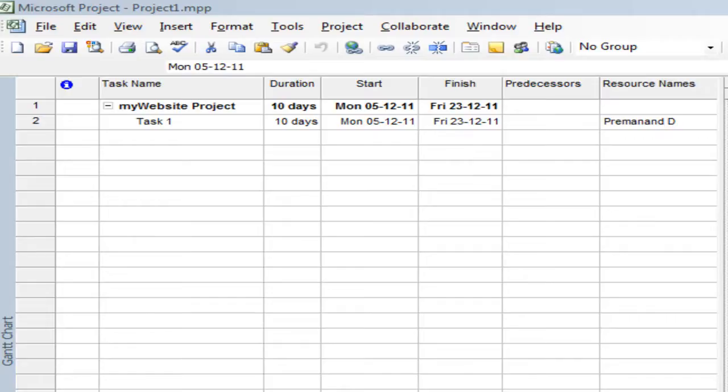So that when you schedule a task for a particular resource or team member and if there is any vacation plan for that team member, then the tool automatically takes care of scheduling it appropriately. The dates are appropriately aligned or synced up with the vacation plan and it gives you a clear view of when the project can end considering all your team's vacations.